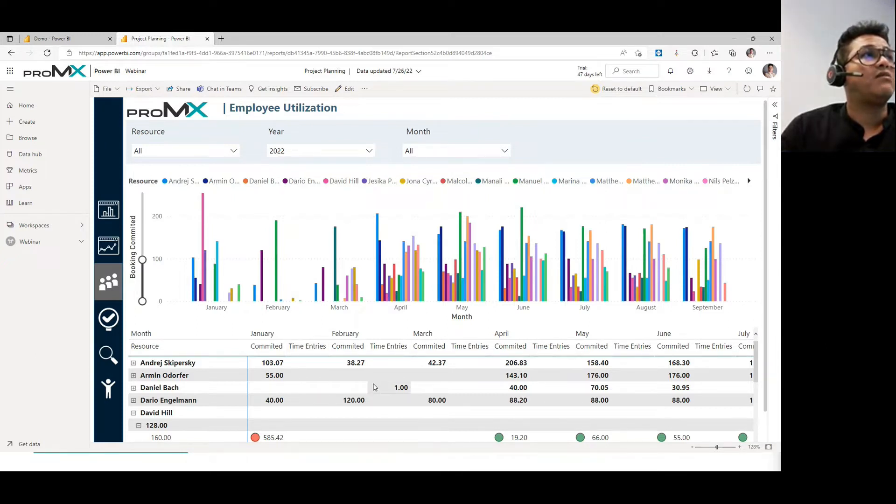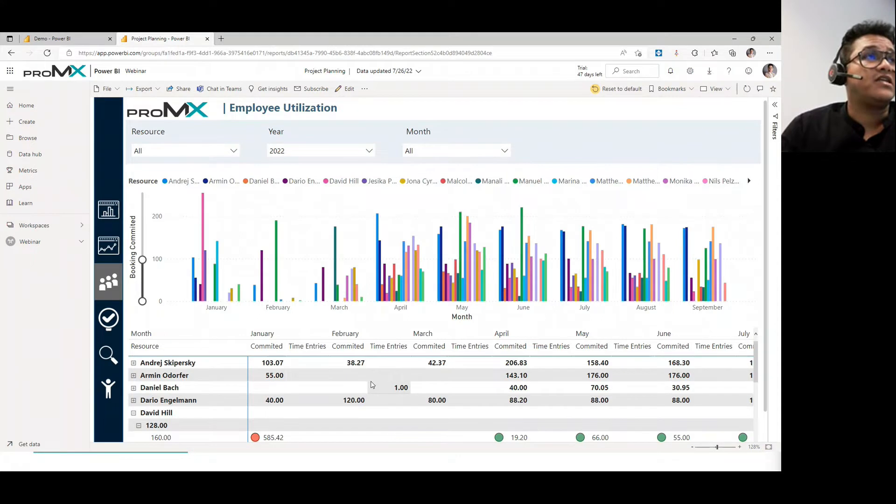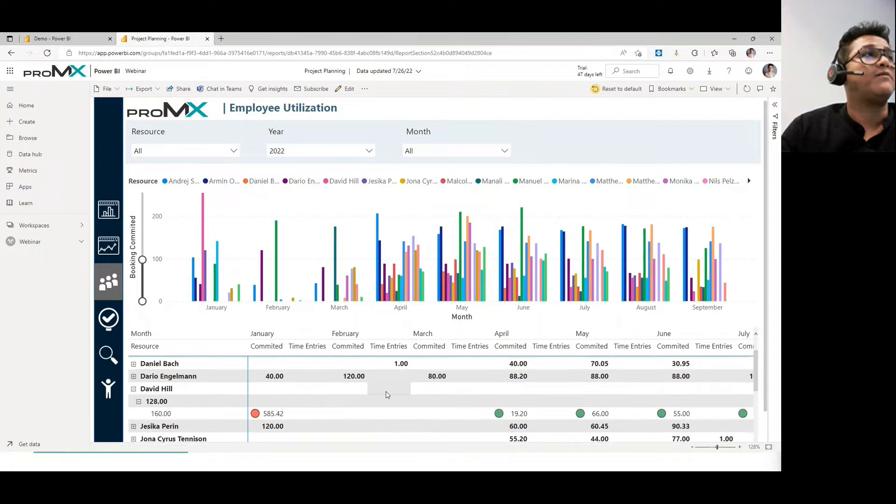If you see Daniel Bach here has a time entry of one hour for no allocation done, but that's also an interesting thing to see that people are not committed to the project, but they are doing time entries to the project and stuff like that.